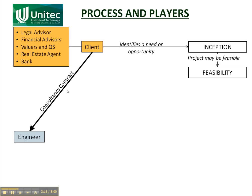The feasibility study is usually done by the engineer, and a consultancy contract is usually established. A contract means that there is a binding relationship — they both have responsibilities to each other, and if one of them reneges on those responsibilities, the other one can sue them. For the feasibility study, the engineer might not have in-house expertise in geotech, so he might go to another consultancy and ask them to do the geotech. That's what a sub-consultant is. It might be the same with surveying.